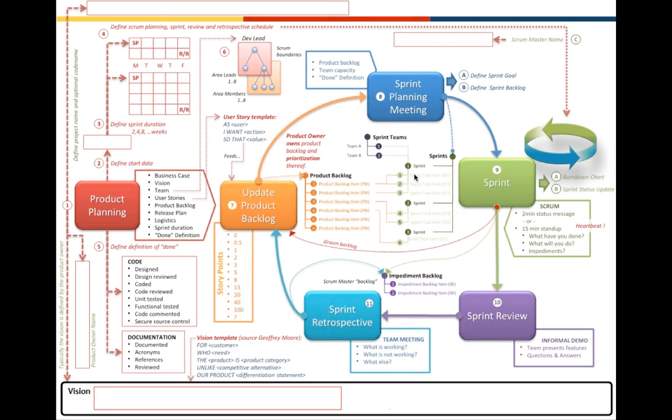It is important to coordinate the start and end of the sprints as well, because it makes it easier to collaborate if needed, to do scrum of scrums, which is to learn from each other team, not just from individuals. And also, you want to be aligned with the release. For all the scrum teams that we have, it is the same release. They're working towards the same release, so they're in tune with the same sprint plan, per se.